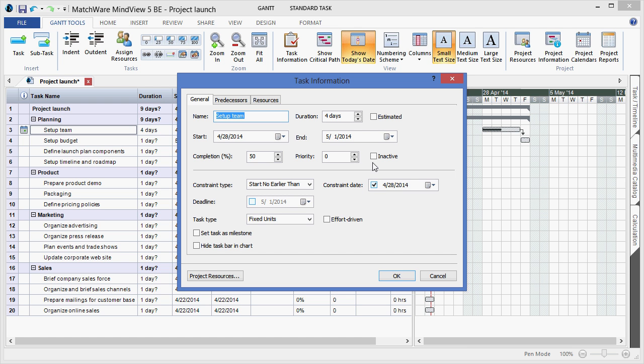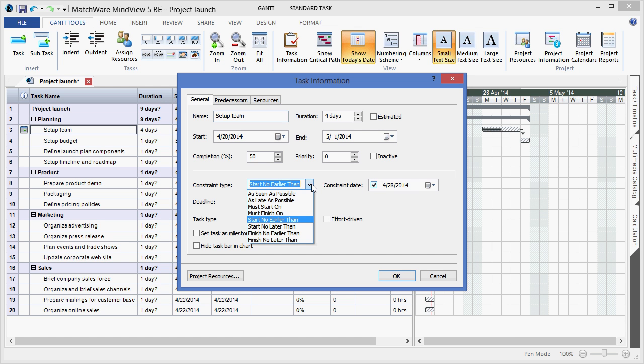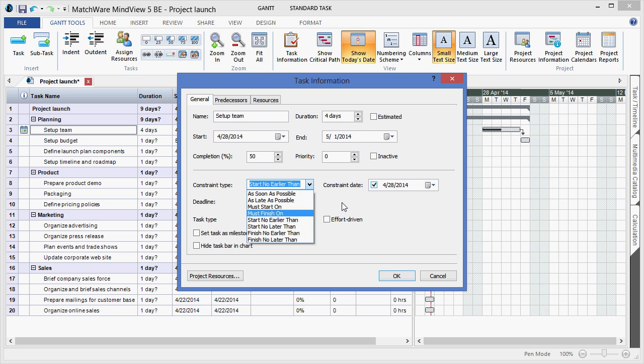A popular feature for project managers would be to apply a constraint to a specific task, if you need to lock a task's start date or end date, or define when you can specifically start a task.